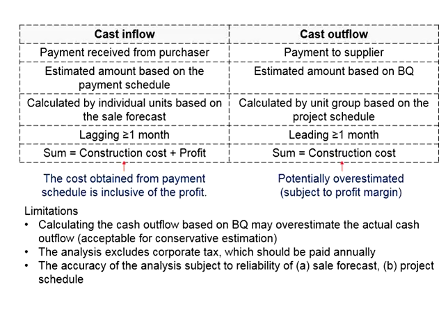Knowing about this, if you wish to have a very accurate estimation of the cash outflow, the estimation based on the bills of quantities will have to be deducted with your estimated profit margin so that it more closely reflects the actual expenses for your project. Now the next question will be, do you really need to do that? Of course, it will more accurately reflect the actual spending of the project.